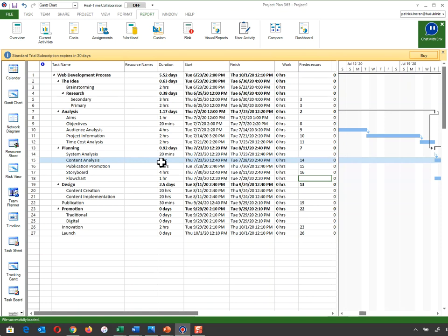And finally, because this is a group of numbers, so to speak, anything from 19 on, 19, 20, 21, all the way up to infinity and beyond, I can't put any of these in there because these are all dependent on 13 being finished. You can see here, all of the ones down here are dependent on 13 being finished, and flowchart is part of 13. So the answers I got are 1, 13, 18, and from 19 on. Any number higher than 19.